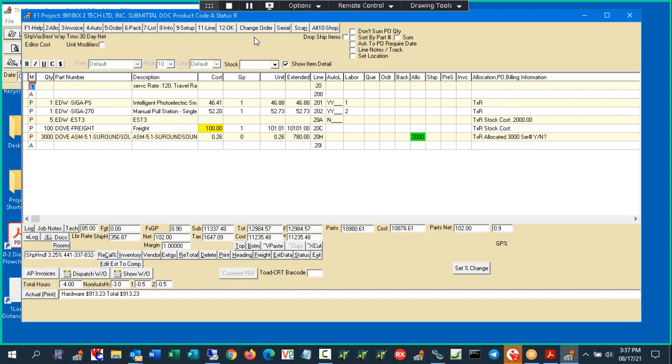But the reality is you really want it to come on automatically once you set fixed price, because you don't want to think, oh, I forgot to turn that module on and it should have been a change order. There are a couple of different ways it can come on: one, when you set fixed price directly, or two, when you change the status to an active job. So you can think through how you would implement it. Initially, I would say put it on demand until you're used to it, and then have it on automatically.